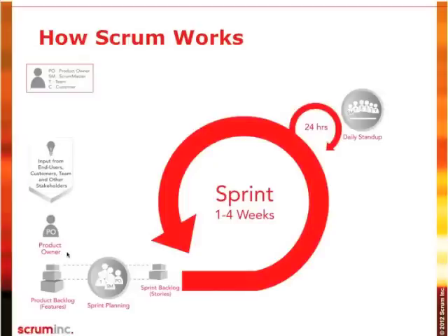Once a day, the team participates in a ritual called the daily stand-up. This is intended to ensure that everyone on the team is aware of what everyone else on the team is working on. Each team member goes through in turn and talks about what they've done the previous day, what they're planning on doing during the upcoming day, and any impediments or things that are holding them back or preventing them from working as efficiently as they can.